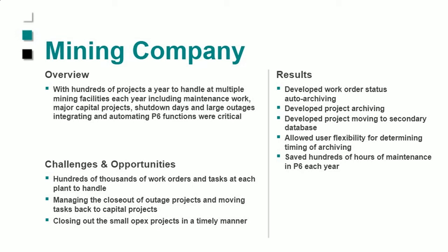We've got project auto archiving. We've got project moving, so they move it into an archive band inside their existing project. They leave it there for a certain amount of time, and then once that time has elapsed, I think it's 90 days in their case, we actually grab that and push it out to a secondary database. Okay, so that's their process, and it really saves them, again, hundreds of hours of maintenance because they don't have to take care of it. It's done automatically, and they too are using Power BI for additional reporting.